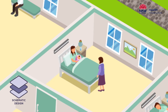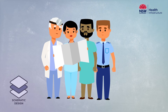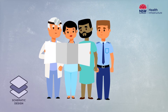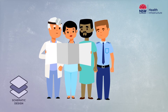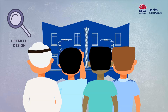Schematic design provides the next level of detail, such as how rooms and services relate to each other and how patients and staff flow through the facility. Once schematic design is complete and reviewed by the project user groups, the redevelopment moves into the detailed design phase.